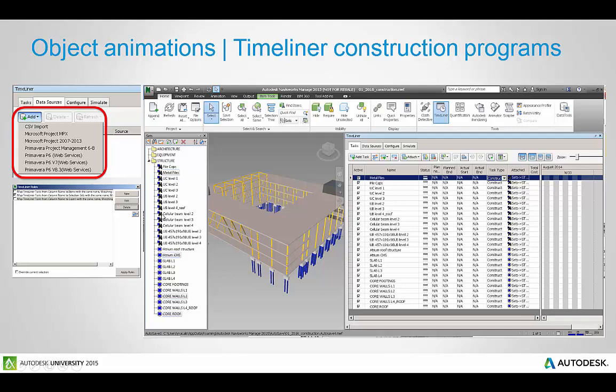So over here is a search set I've created inside Navisworks. Cellular beam level 2 when I go to run the rules to auto attach those tasks it's going to attach it to that cellular beam in the construction program.